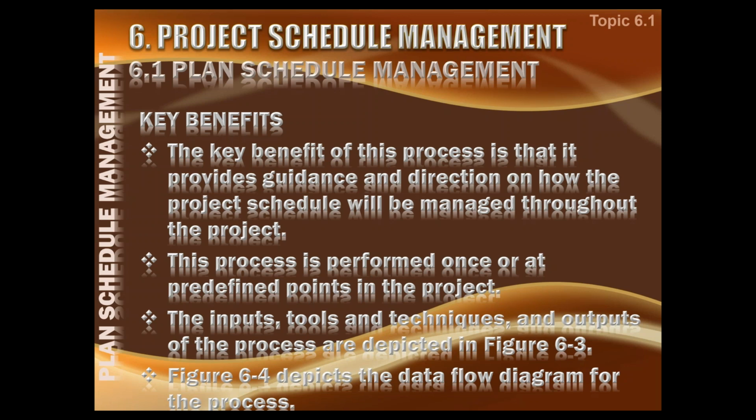If you are going for an iterative life cycle, agile life cycle, then probably you will be making a broad outline plan for the overall project, and then for each iteration you will have a detailed plan, and you will only plan for 1 month.